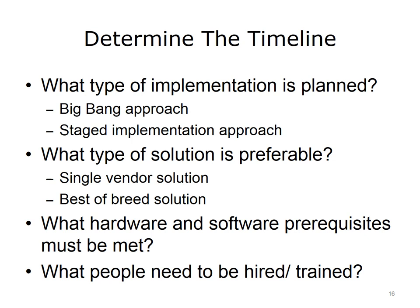Each type of implementation has advantages and disadvantages. The Big Bang approach usually has a shorter implementation time but a higher risk of failure. The Staged implementation allows clinicians to gradually acclimatize to the EHR and is more amenable to physicians who are resistant to change. Staged implementations are associated with lower initial productivity losses but higher total implementation costs compared with the Big Bang approach. The culture of the organization, as well as considerations of cost and availability of essential personnel, may influence the type of implementation selected.